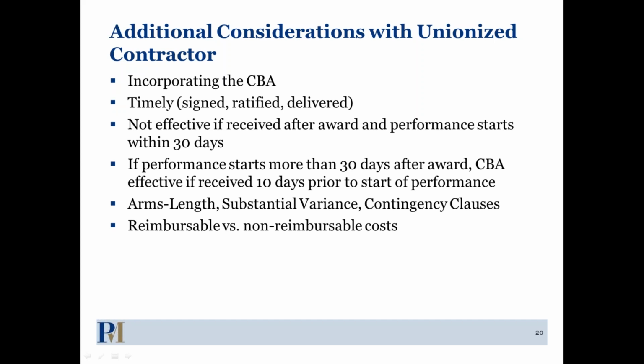The other question we got with respect to CBAs was if you negotiate higher wages in a CBA, would you make yourself eligible for a price adjustment. It's the same as with a wage determination. So the CBA just becomes a new wage determination for you.